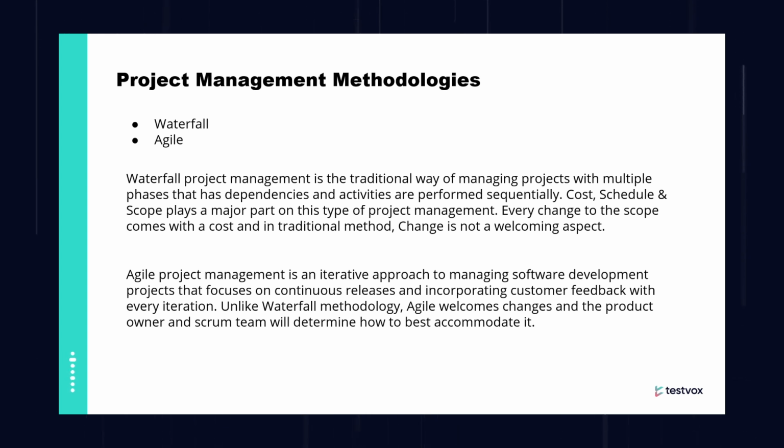If you're going to adopt Waterfall methodology for developing software, it means the delivery of the product is going to happen only at the end of the project, right? And at the end of the project, if you're going to deliver something, the project stakeholders or the client is going to come back and say, no, this is not what I asked. I want this change. This is completely not aligned with what my requirement is. If that's the kind of feedback we get in Waterfall, we have to go back and start from scratch. And the cost of resources, the cost of time, is going to be huge, right? And that's why changes are not welcome in Waterfall.